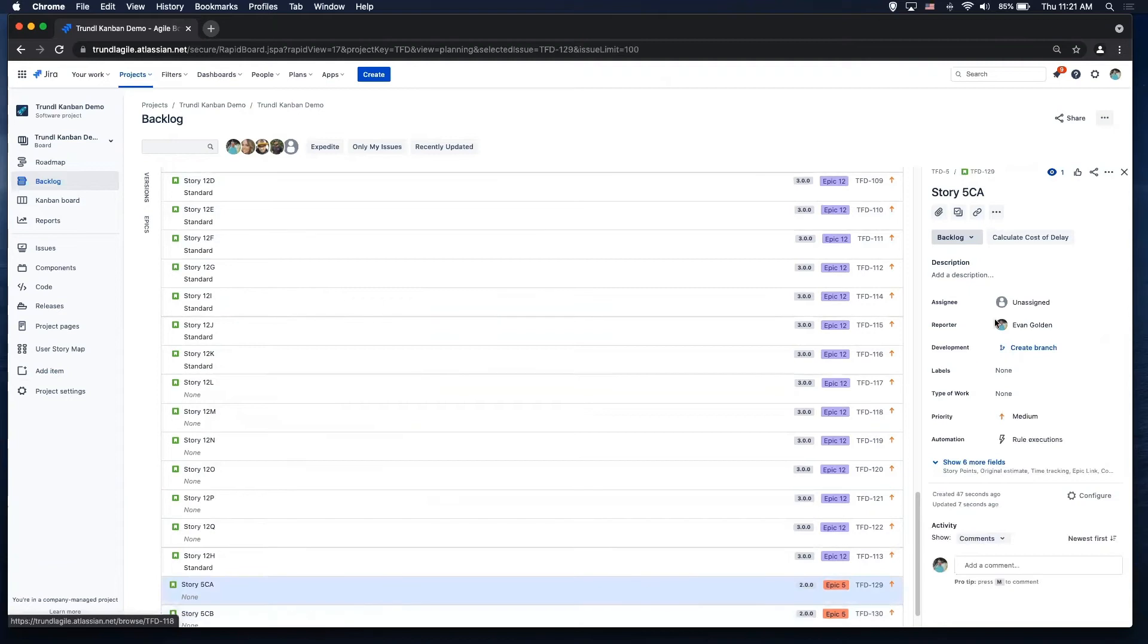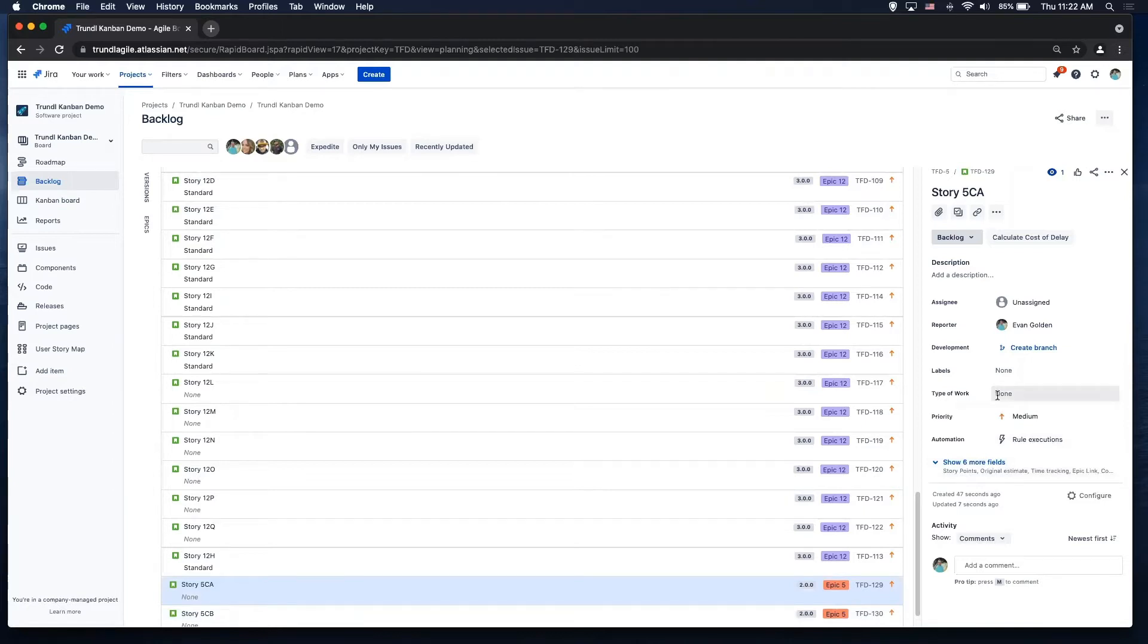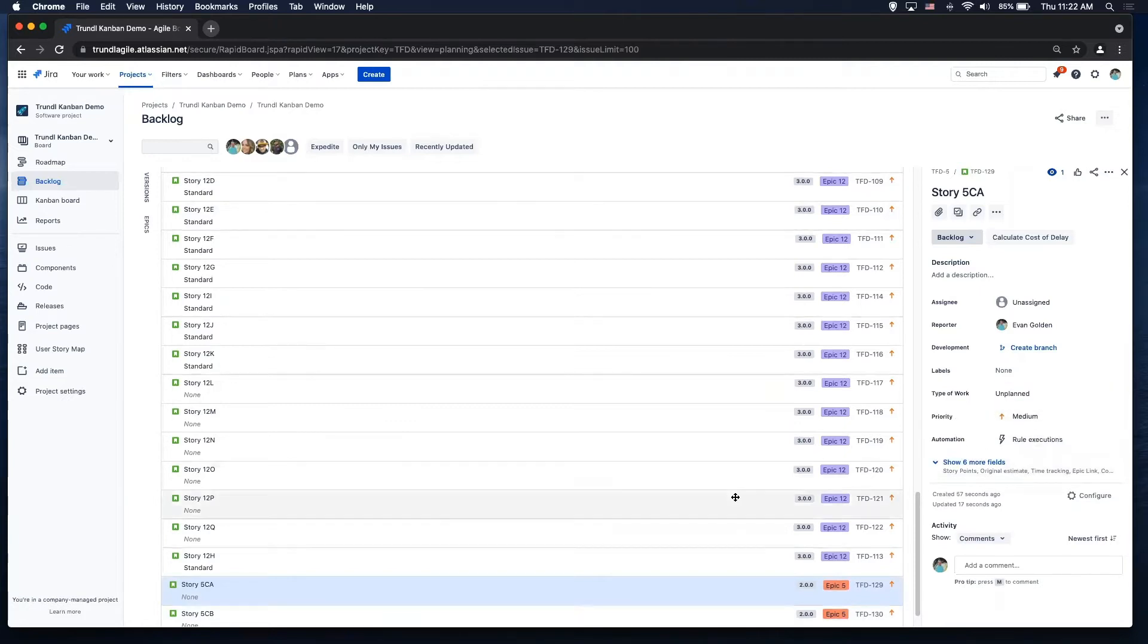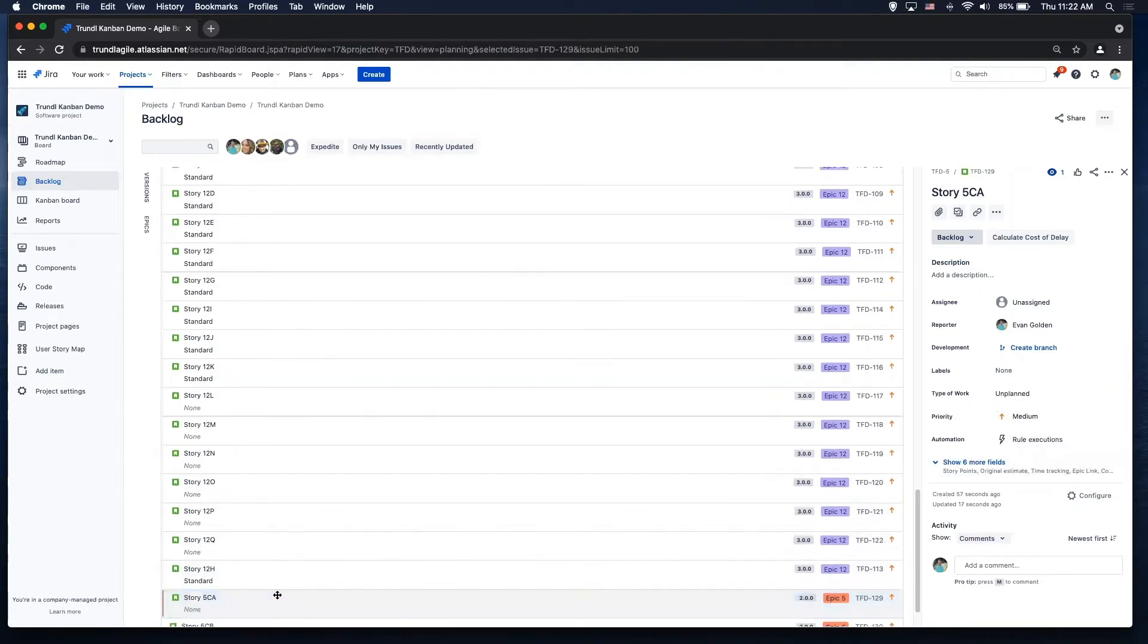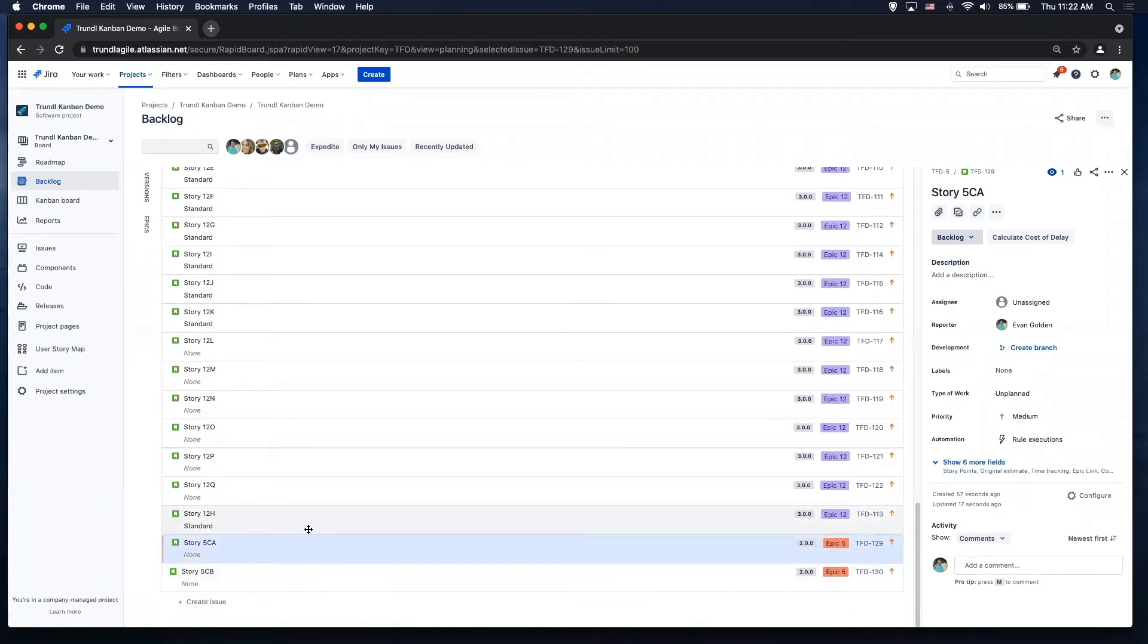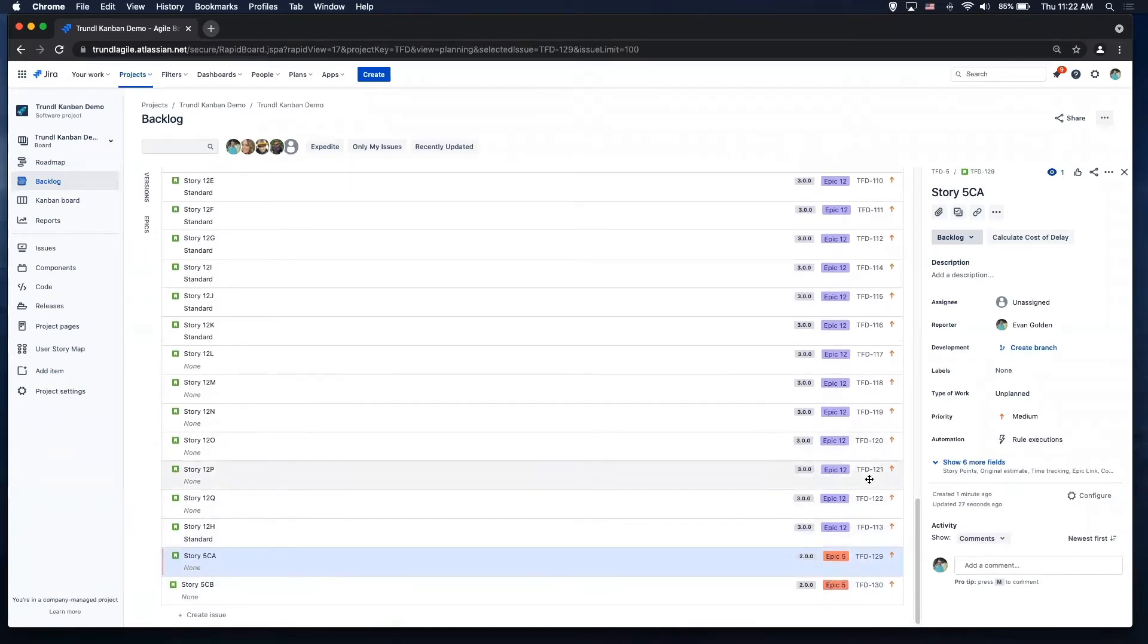And then basically I can go into any one of these issues and you see I get the expanded issue details for you. What I want to show here are a few things. One is the type of work, so I added this custom field here and this allows us the ability to say if the work is unplanned or not. And you'll see I added a configuration here where the unplanned work on the far left is red. It really calls it out for us.